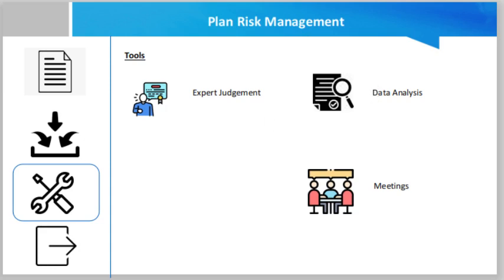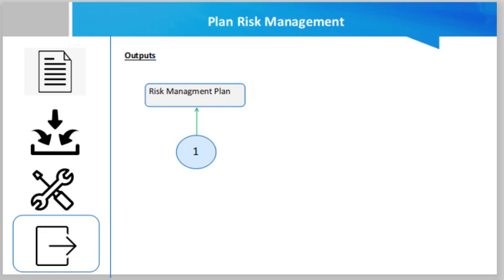Meetings are also a tool — the risk management plan may be developed as part of the project kickoff meeting, or a specific planning meeting may be held. Attendees may include the project manager, selected project team members, key stakeholders, or team members responsible for managing the risk management process. The output of this process is the risk management plan, which is a component of the project management plan that describes how risk management activities will be structured and performed.